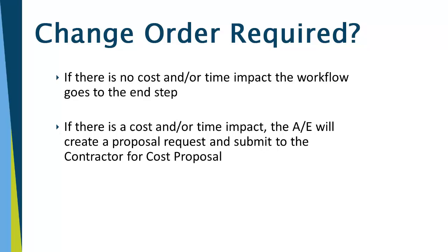If there is no cost and/or time impact, the workflow goes to the end step. If there is a cost and/or time impact, the architect will create a proposal request and submit it to the contractor for cost proposal.